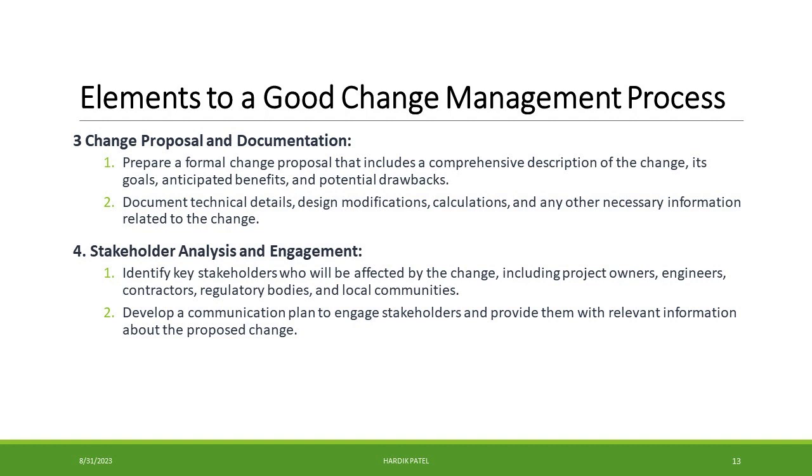Thus, to sum up, it means preparing a formal change proposal that includes a comprehensive description of the change, its goals, anticipated benefits, and potential drawbacks. Document technical details, design modifications, calculations, and any other necessary information related to the change.